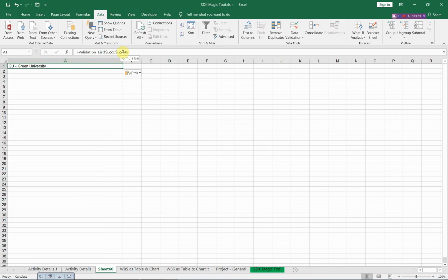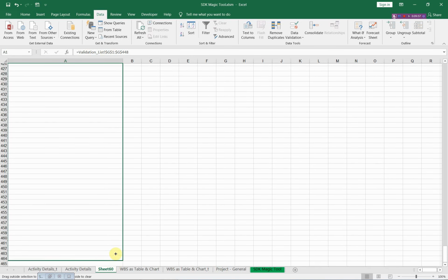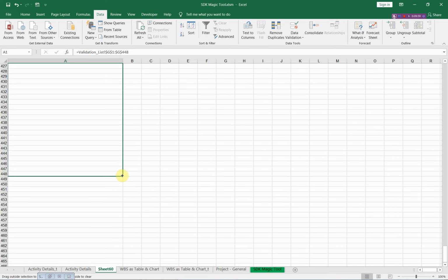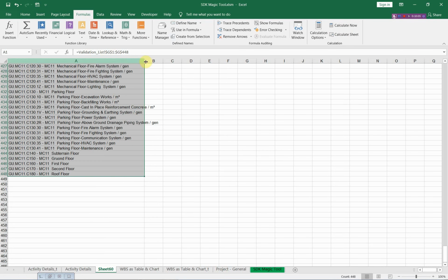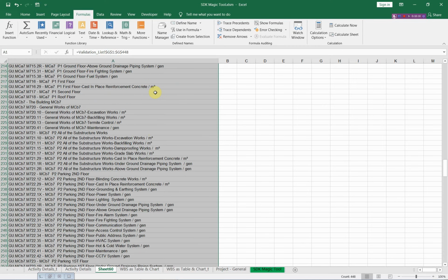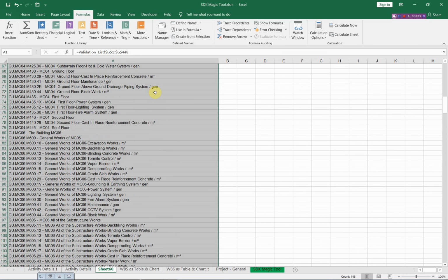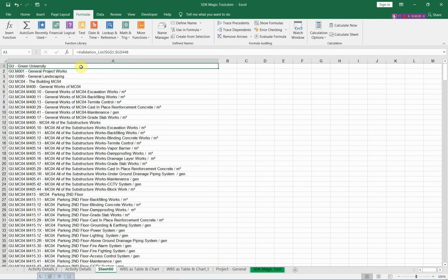As you see, we have 448 items. Let us draw to 448. This will be the complete list of the WBS. And now we can calculate from formula. Now we have the complete drop list of all WBS codes with their full names in order to assign the activities to the correct WBS.